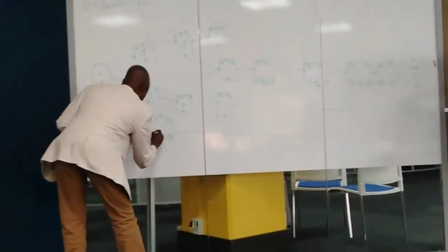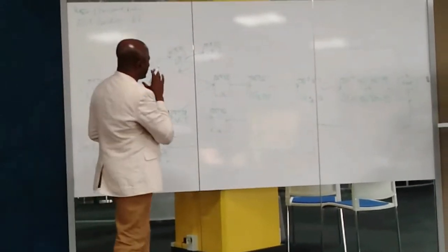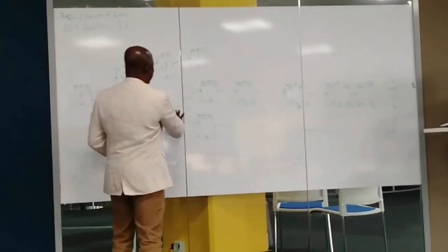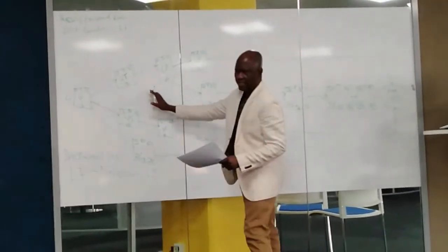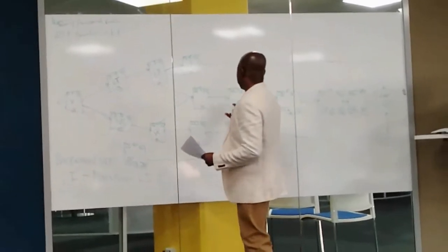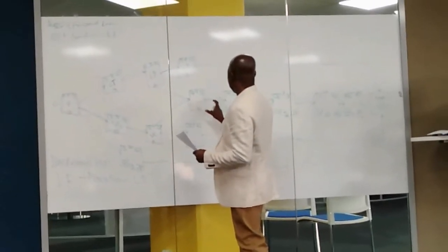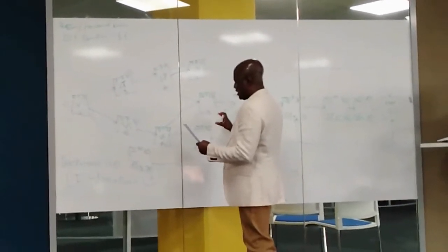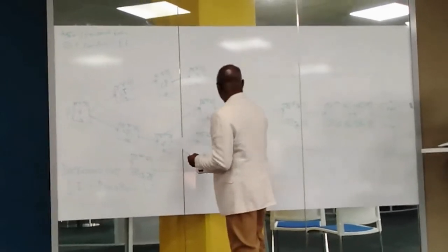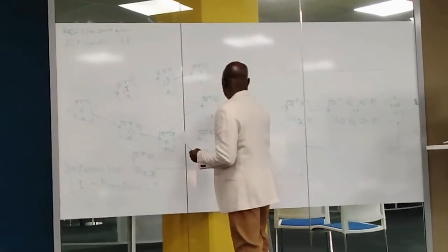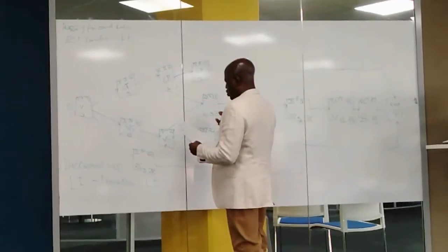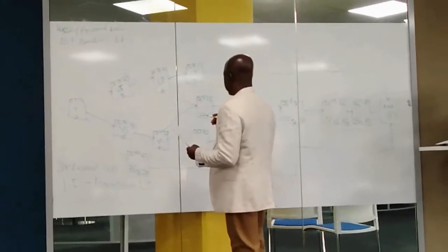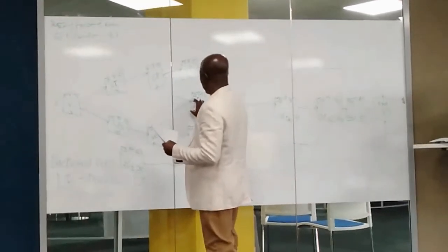But we have activity 8. If you look at it, it's connected to 2 activities, right? And we're moving backward like this. Activity 8 has to be completed before we will do activity 9. So we're going to bring our 25 down here. We are still looking at the connection here. So minus 3 is going to be 22. Right? Then this and this is connected to this.